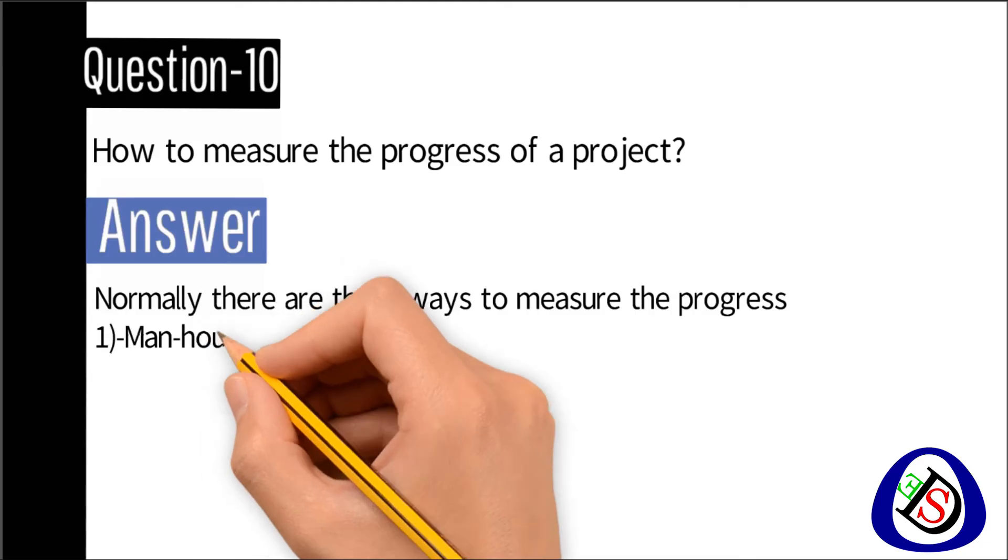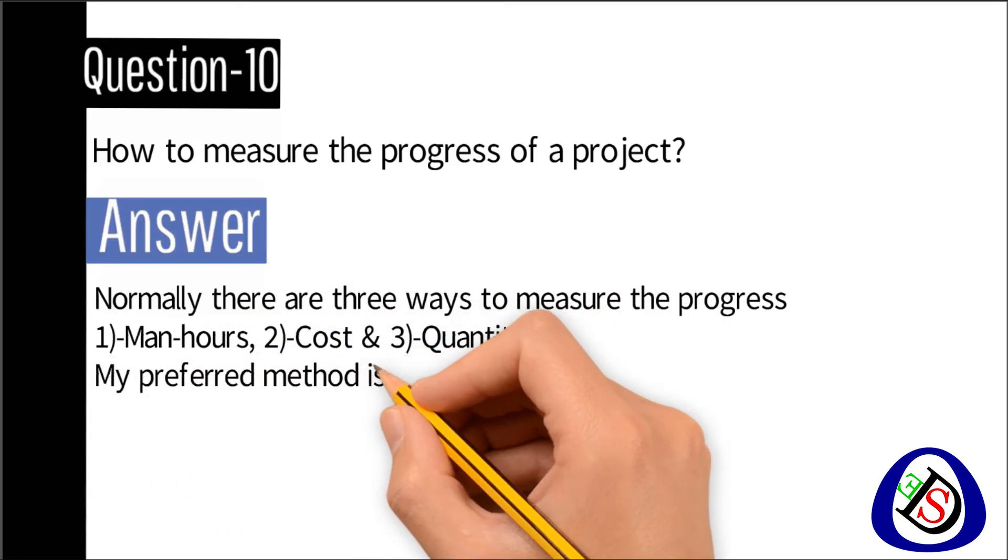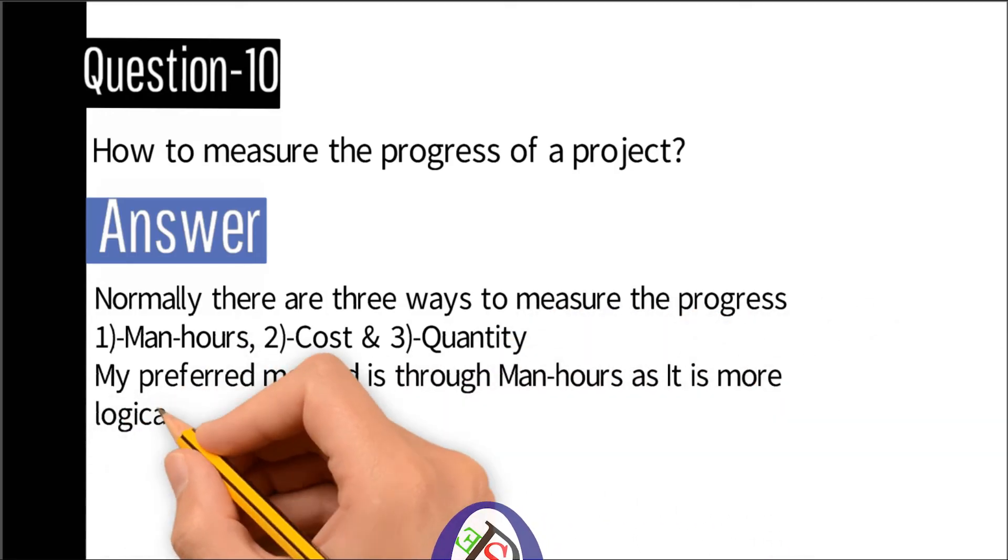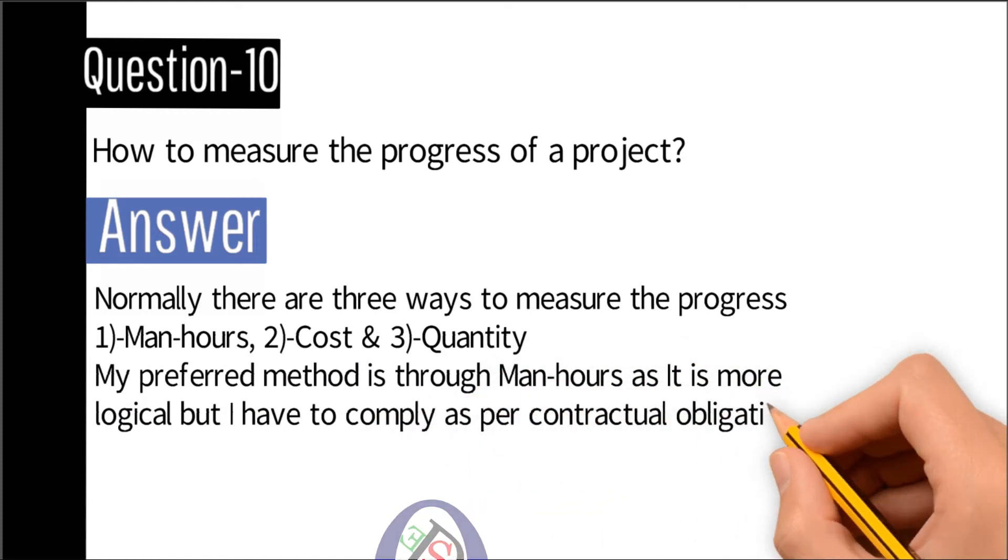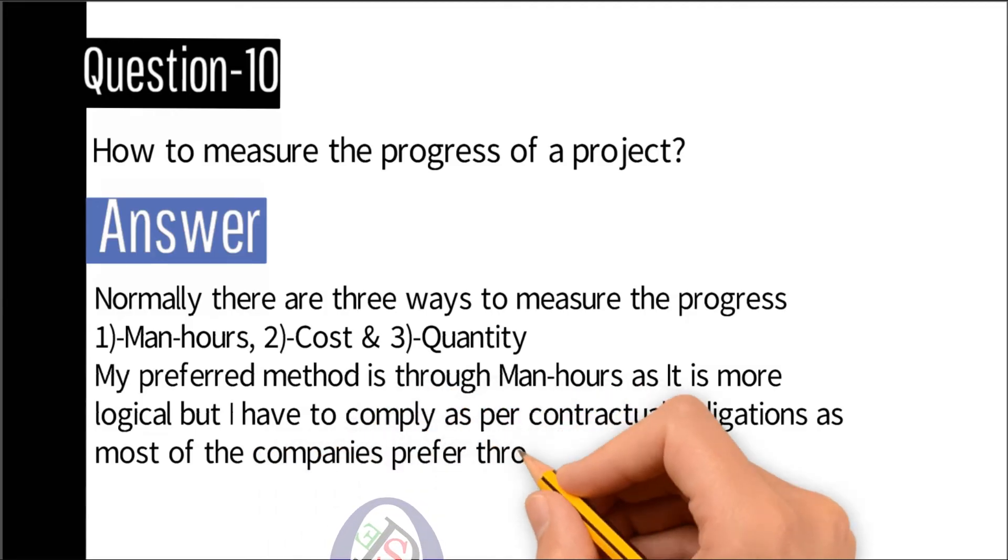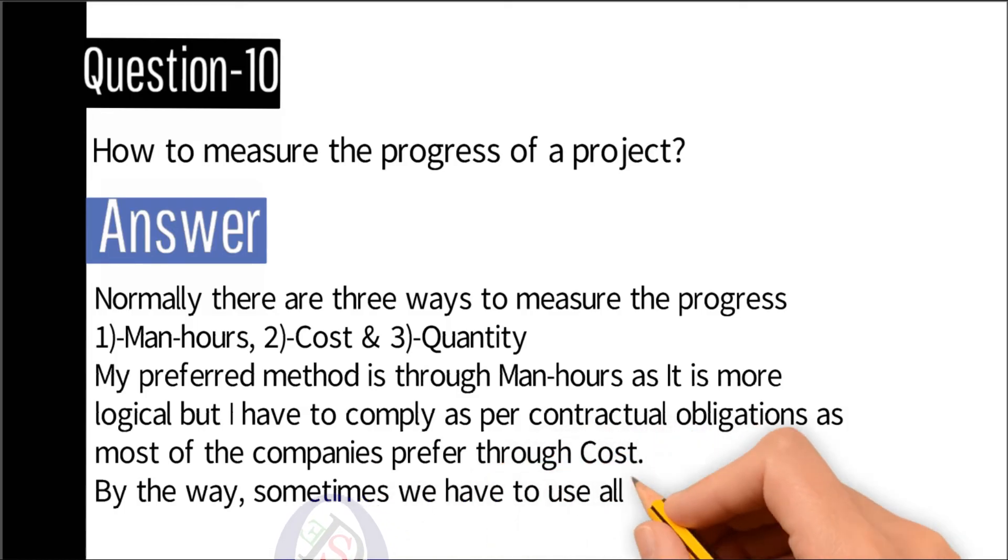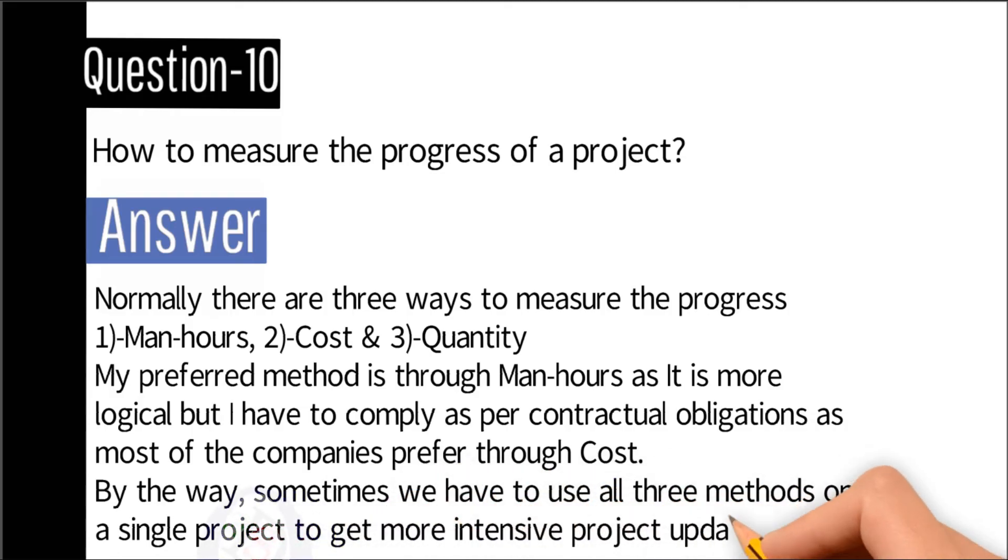One: man hours. Two: cost. Three: quantity. My preferred method is through man hours as it is more logical, but I have to comply as per contractual obligations as most companies prefer through cost. By the way, sometimes we have to use all three methods on a single project to get more intensive project updated status.